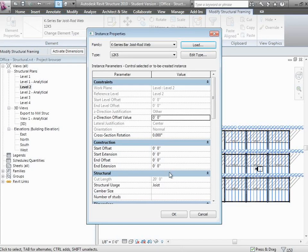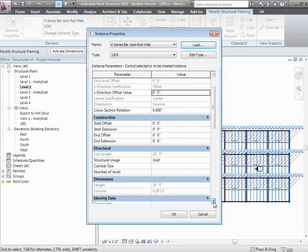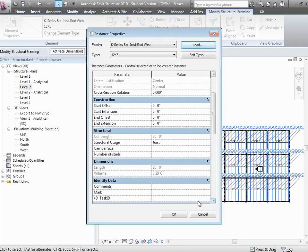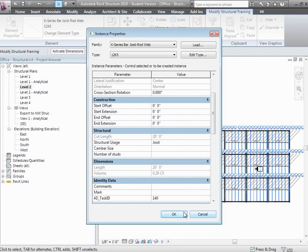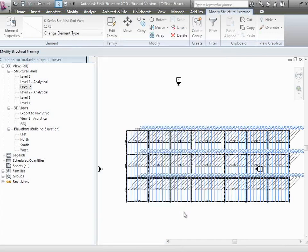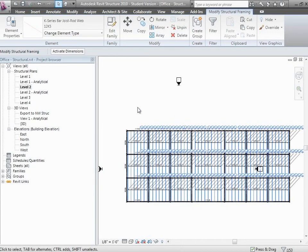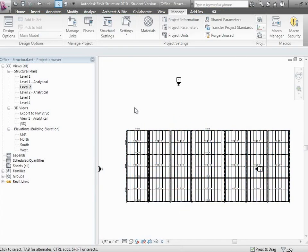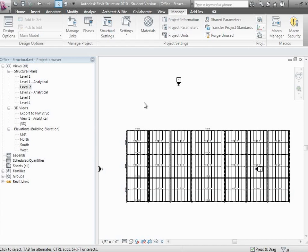Now, there's nothing magical about these numbers that I'm using. All you have to do is work out as a project team what numbers you're going to use in the schedule and what numbers you want to work on in the model. This is one of those things where typically you'd set this up early in the project. In the same way you set up a work breakdown structure for estimating items, you need to set up a schedule structure for how you want to map things. So as people model, they can associate things with the appropriate activities. Or you can add these in later. But we want to do something like that.